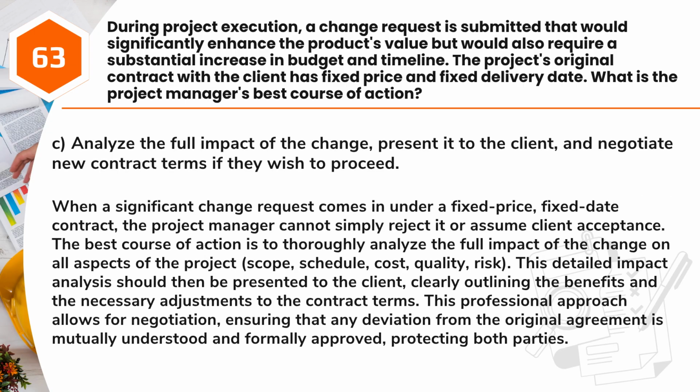Answer: C. Analyze the full impact of the change, present it to the client, and negotiate new contract terms if they wish to proceed. When a significant change request comes in under a fixed price, fixed date contract, the project manager cannot simply reject it or assume client acceptance. The best course of action is to thoroughly analyze the full impact of the change on all aspects of the project: scope, schedule, cost, quality, risk.